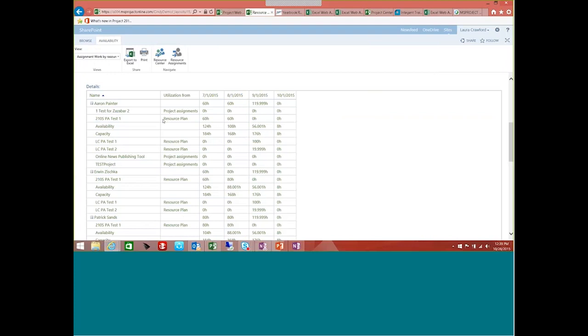All right, so if I just have a project, I've named it, I've given it a start date, and I've saved and published it to my Project Online environment, I can then create a resource plan for that project without actually having a schedule built. The idea is that I can say, I need 2 developers, I need a project manager, and I need an analyst. And I need them for 60 hours in July, 60 hours in August, and then I'm done for this particular project.